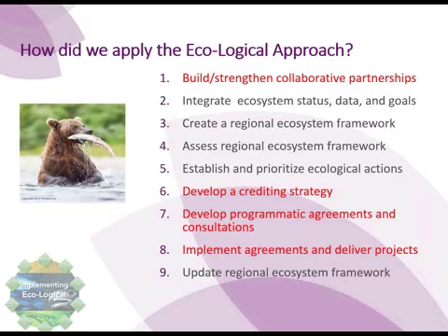And so we weren't necessarily looking at it holistically or proactively. We would screen projects when they became part of the work plan, which is after the budgets were established and the schedules were established. So that was a little late in the process. So after this gap analysis, we got our own things straight.